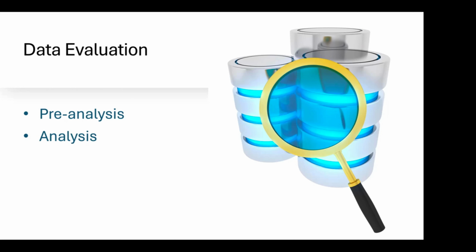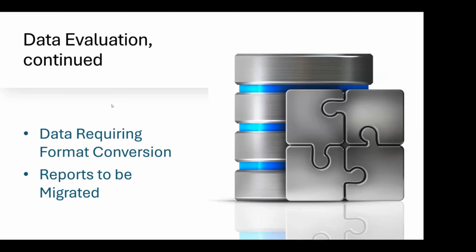Doing some analysis, typically using the data migration tools of the provider at the start of the data migration process. For each data source, they'll do an inventory of the data and basically report, here's what is in that source system. And it's usually advisable to conduct some analysis on that actual inventory for things like missing or invalid attribute values, common ones like patient ID, accession numbers, and even just inconsistent ones. So if they don't match the schema that you use. I've got a couple slides left, and then I'll hand it to Mike.